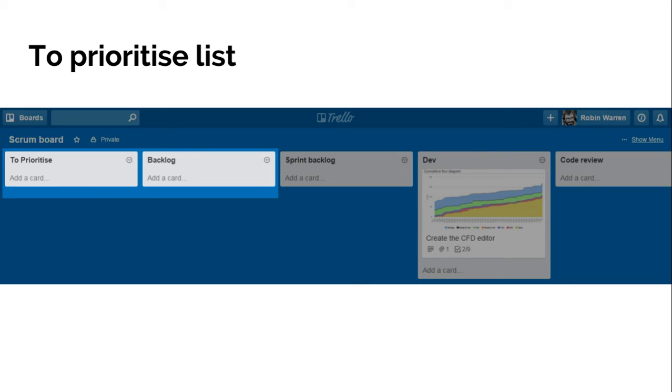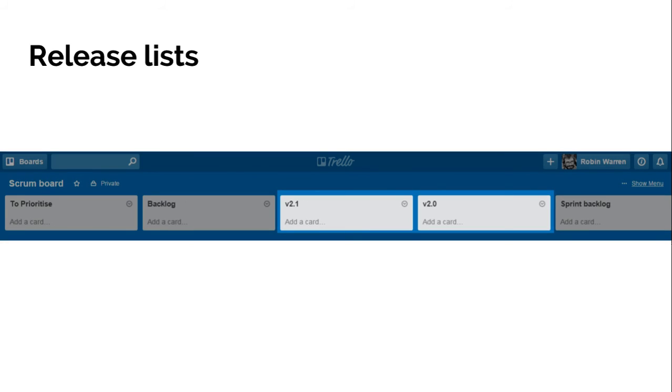The next thing to add is an unprioritized list. So it just stops people immediately logging everything straight into the top of the backlog and go into unprioritized. And then product owner, whoever is responsible, can come along and move things from there into the backlog list whenever they have time.